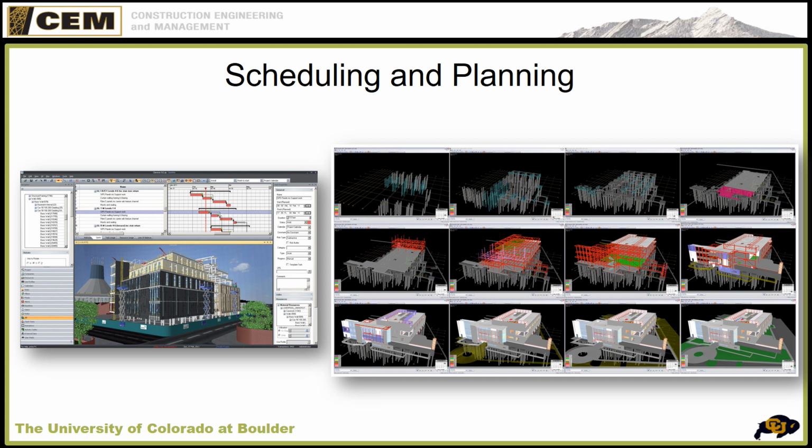The labor pool. So if we say we can get 3,000 people on this job site and there's just not enough labor to do it, that makes our schedule useless. So we need to understand the trades and their availability. So making assumptions based on fact will turn our schedule into something that we can really use.